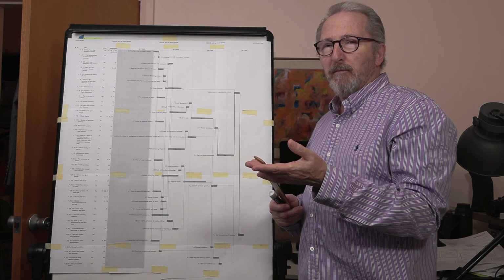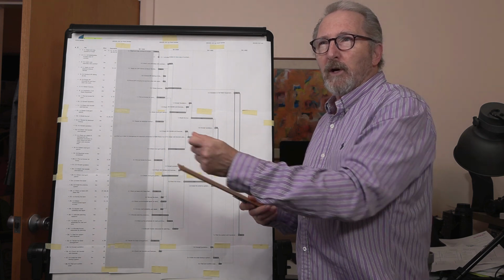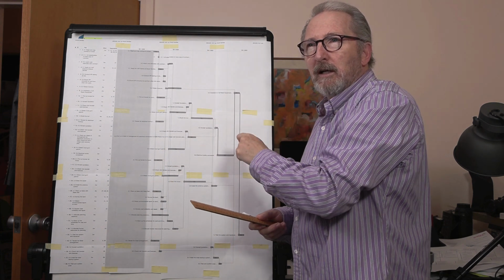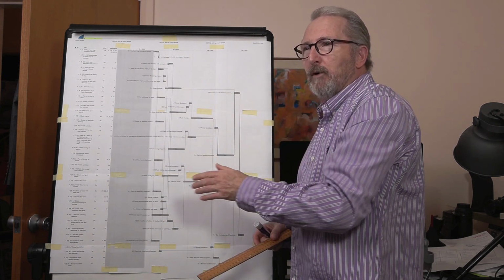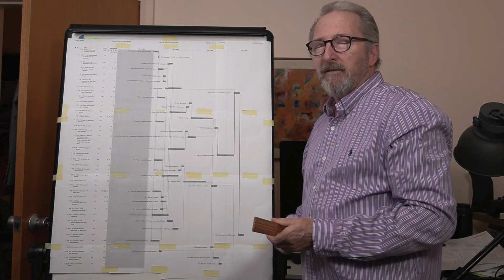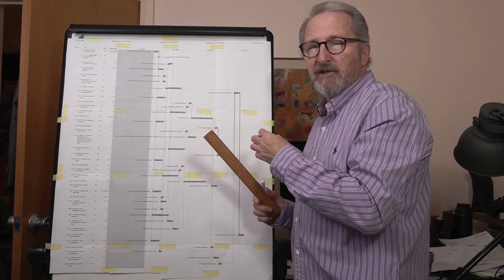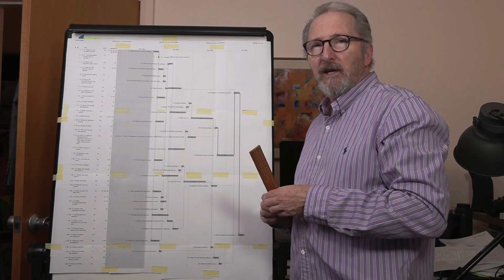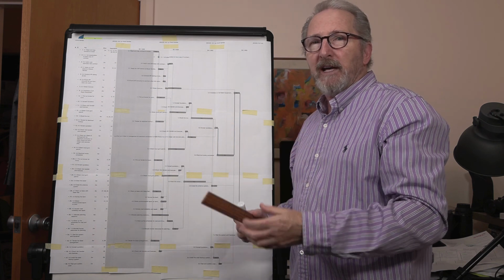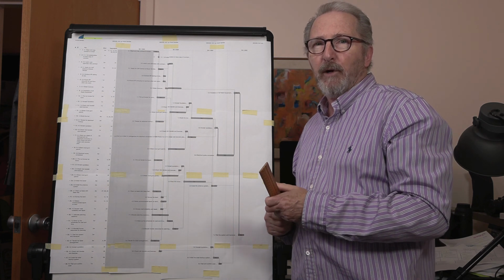Then we had to take that WBS into a Part 2 document, whereby we drew a quick mud map, so to say, using this purple colour, of course, on the whiteboard, and then that allowed us to see where the predecessors and where the successors were to put into the WBS, and then final step to take that and put it all into the project management software. In this case I'm using the Mac, and I'm using Omniplan Project 3.